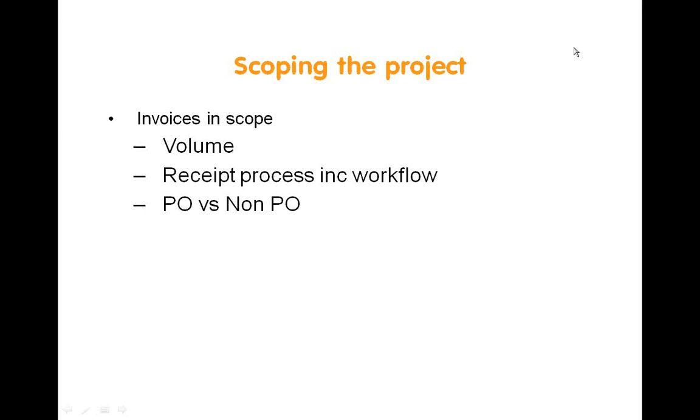And meeting with those suppliers and getting them onto your e-invoicing service provider platform, you may be leaping through your program very, very quickly, because if you've got one supplier sending you maybe 30,000 invoices per annum, if you convert that supplier, you're going to be making some fairly swift gains in your e-invoicing project. So it's good to know what your volume is, and it's also very important to know where the 80% of your invoice volume is coming from.